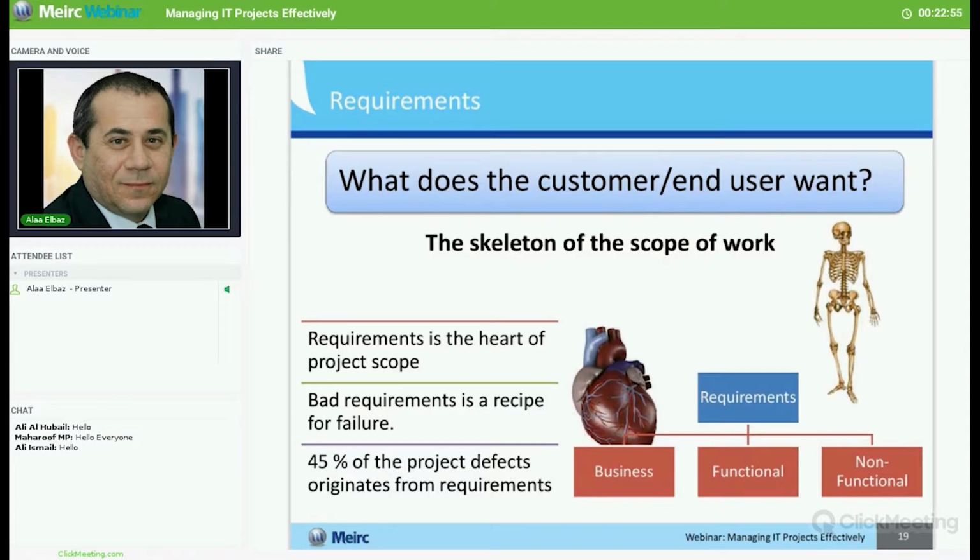Many reasons. One of the reasons can be the customer sometimes gives you their requirement in technical terms, which probably he doesn't really totally understand. Another reason we're having is sometimes the IT people jump into conclusions and do not listen to the customer very carefully. That's why it's very common in IT projects that we're having misunderstanding with the customer.